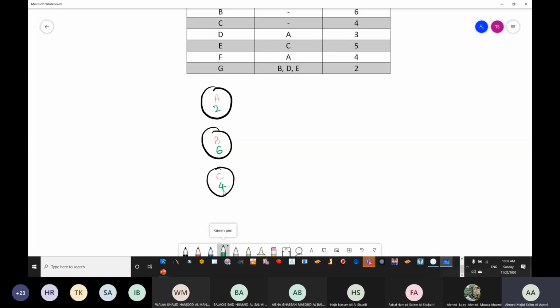Now, since there are 3 activities starting from the beginning, we need to have an organizing task. Always, there must be only one beginning. You cannot start 3 things at the same time. Always, there should be one start and one finish. So what do we have? We normally have a task here.